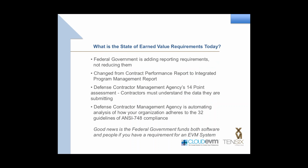All right, great. Thanks, Mark. Welcome, everybody. I want to talk a little bit today about earned value management, and particularly about what's going on in earned value management today. There's been a lot of talk recently about the updated thresholds that DCMA has published, raising the level of contract value that is going to drive whether you have to have a certified earned value system. And I think that's getting confused somewhat with whether that means you're going to have to do earned value or not. When in fact, if you look at what the government is rolling out outside of those thresholds, the earned value requirements are actually increasing in the industry as opposed to decreasing.